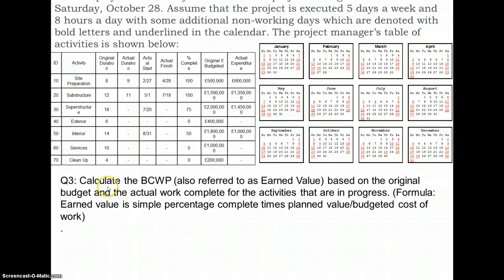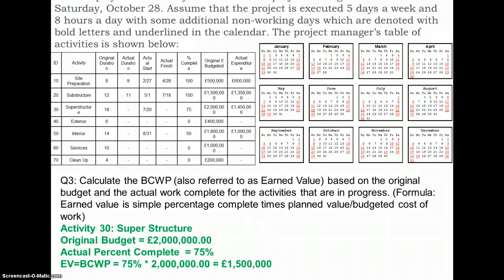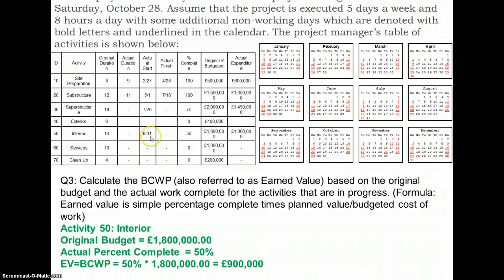The third problem is to calculate the budgeted cost of work performed, also referred to as the earned value, based on the original budget and the actual work complete for the activities in progress. For calculating earned value we use the formula: percentage complete × planned value (budgeted cost of work). The superstructure activity has an original budget of £2 million and 75% is complete, so the earned value is 75% of £2 million = £1.5 million. The second activity, interior works, has a total budget of £1.8 million and 50% is complete, giving an earned value of £0.9 million.